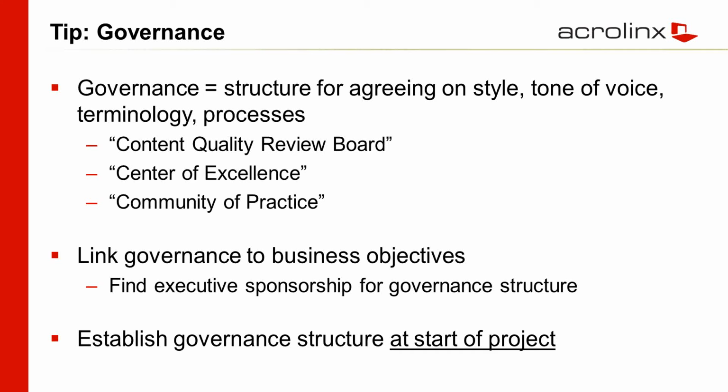And most of you probably know there's a lot of passion around the specific terminology to use. Many of us, if not most of us, have been involved in conversations where there are very strongly expressed views, and those are tough ones. By the way, one technique that I use to avoid having them become so heated is know who's going to be making decisions and separate input from the decision-making process.